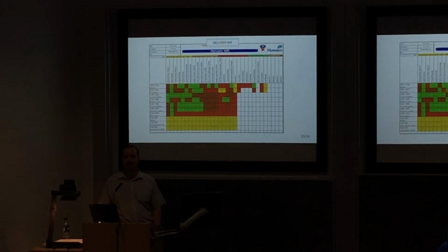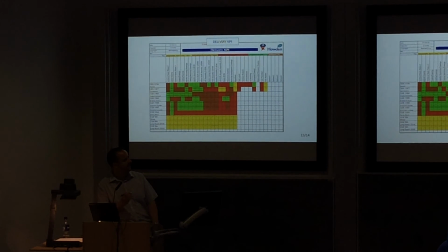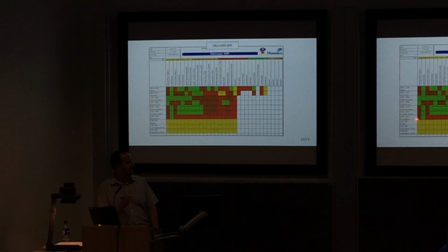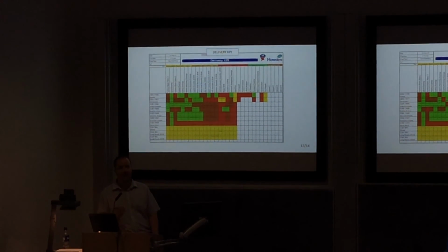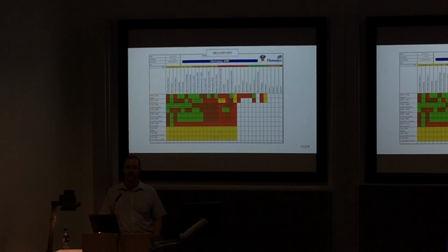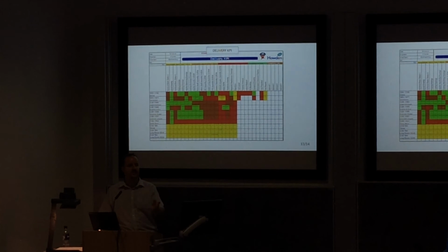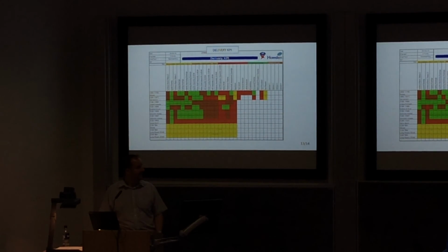It then does a comparison and tells you whether you're on time and gives you a green box, whether you completed it late, gives you a brown box. If you've still got time to do it, it gives you a yellow box. And if you are overdue, you haven't completed the documents, the drawings. An example of this can be getting the CAD work done in time to do the mold design or the solid model. So we would look at the requirements, and if it was late, it would be a red box.